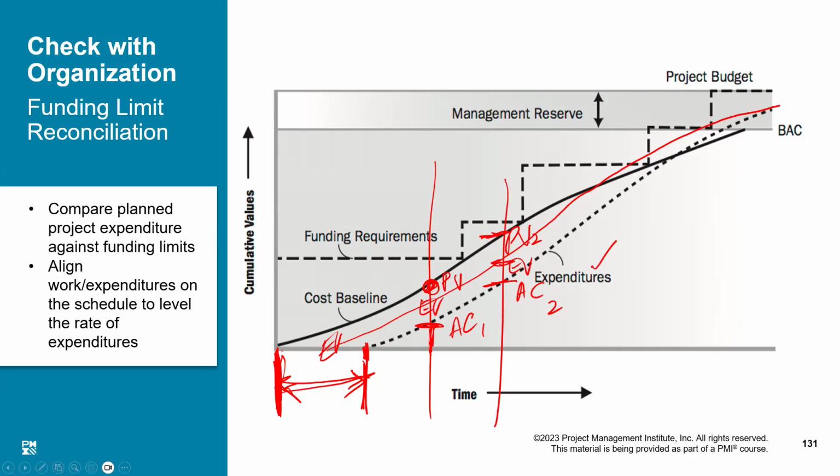So you see, there will be 3 lines existing on this diagram, out of which only one line, the black S curve, is the line of my planned value. The value of earned value and the actual cost will actually be known when we do it, when the project is started. Then we will say, okay, we were supposed to do this much work, but we actually did this much work, and we spent this much money. So there are three things.